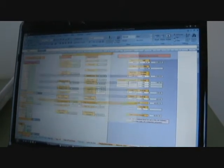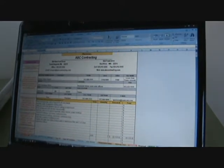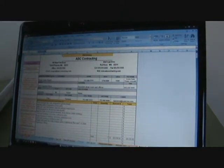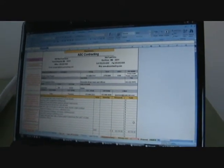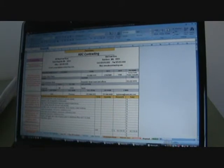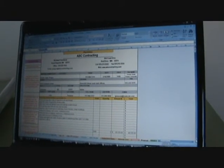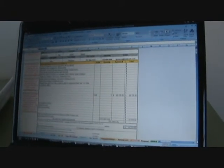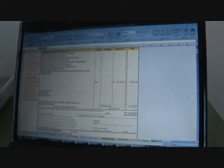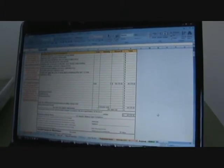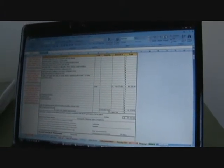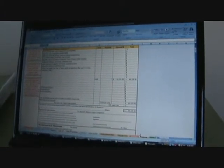So the next sheet is a proposal sheet, and that's where you just type in your scope of work with your price. This could be signed by the customer, and it becomes a contract once it's signed. You can go through that, look at the details.